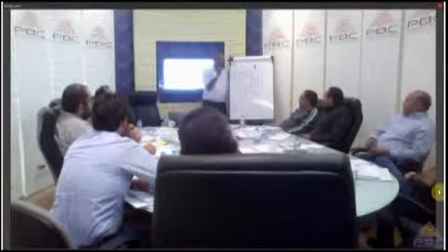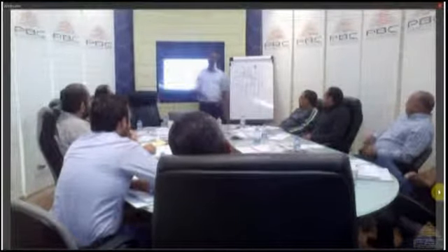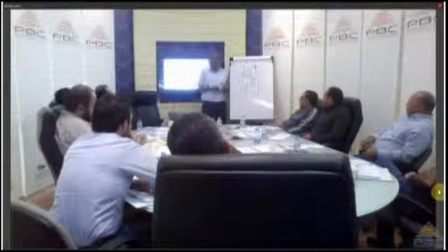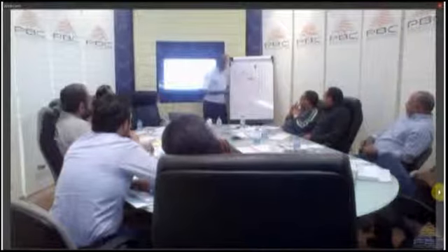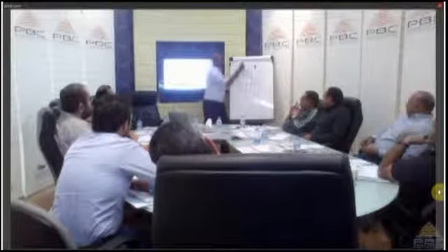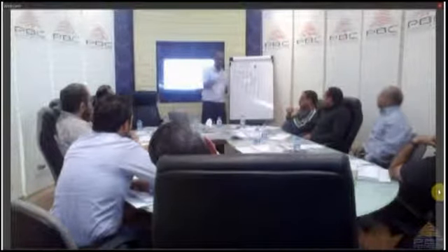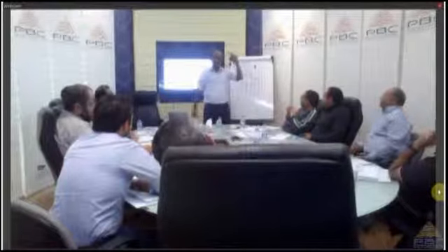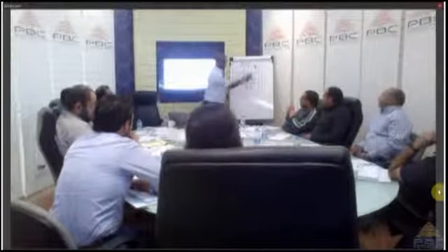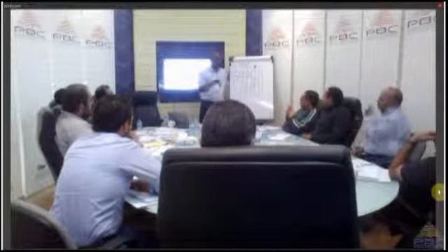To get over that, we have other techniques. We can have a 50-50% rule, which I prefer. It means that once an activity is activated, I will straight away attribute 50% of the cost to that activity in my cost reports. So whenever you see 50% of an activity, you know that this activity is live, it's ongoing.